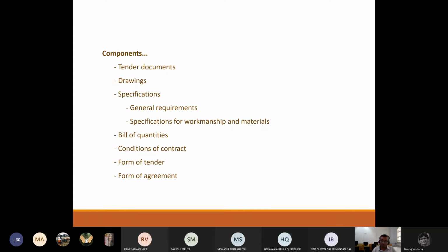Yeah, it has all kinds of specifications from the NBC, National Building Code. All the specifications, right from soil qualities to concrete. And if you're doing it for the government, then there are government-approved specifications for the kind of material. You have to include that, otherwise the contractor can claim he was never aware of it. Then it comprises the agreement, that is the main contract, then the bill of quantities where your figures are.